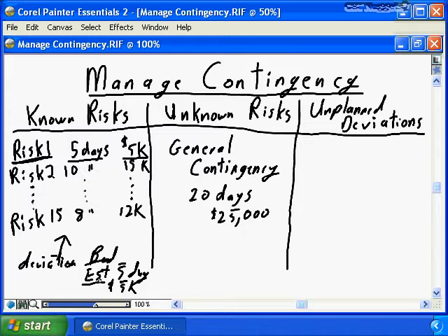If you have bad estimates, it's time to go back to the project plan. It's time to go back to the project sponsor and say, we've determined that we improperly estimated phase 1 for our project. We misestimated the number of business processes. We misestimated the amount of work to be done. Therefore, as a result of bad estimates, we need to go through and allocate additional time, additional funds to the project.